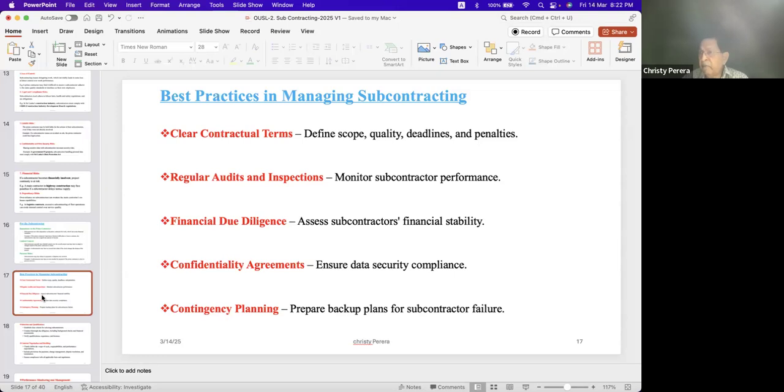You'll have to ask from him the last 3 years, maybe audited financial statements, audited profit and loss statement, right? Like that, his cash flow. They will have to show their bank statements, cash flow, from where the subcontractor finds the funds to perform his duty.